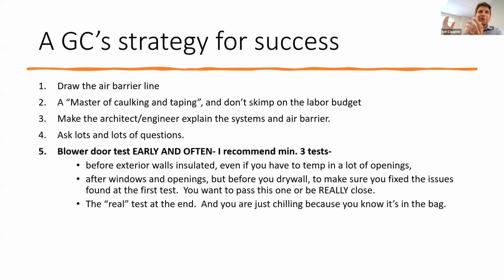We sort of designated a master of caulking and taping, that someone needed to walk around and just really think about everything that could go wrong. So again, we kind of blew it on the budget on one job, but all the money we spent on fixing that, we did early enough that it paid off in the end because we passed our blower door test.